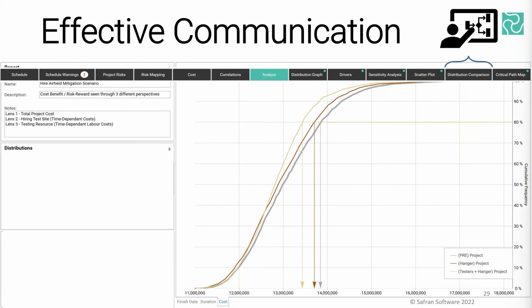So this integration of our cost and schedule risk models then allows us to ask very specific and targeted questions with regards to opportunity proposals and mitigation effectiveness. So each scenario saved into the distribution comparison can compare different possible choices to the combined cost and/or time savings on offer. Conversely, what sounded like a good idea might actually make the risk profile worse. So subsequently, you might not want to recommend those, but you need to do this modeling to test the theory.